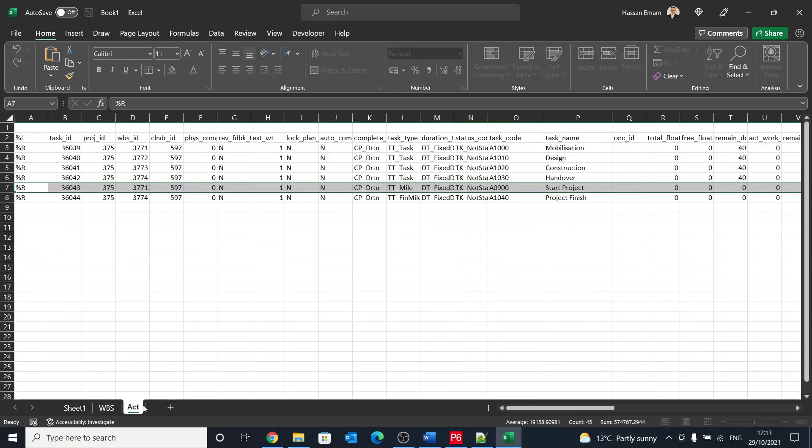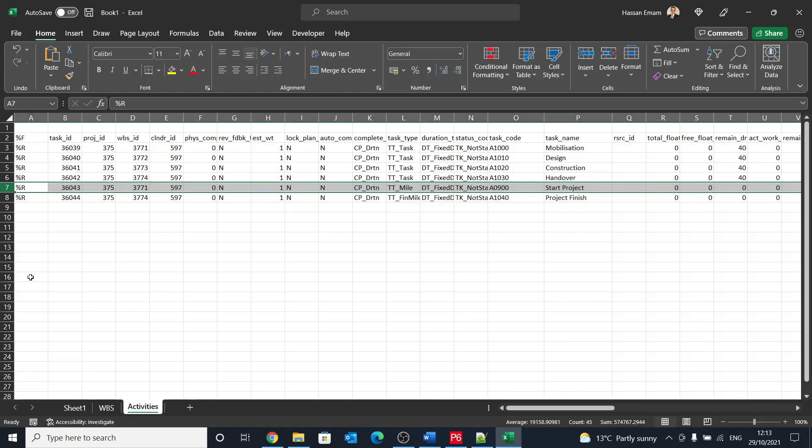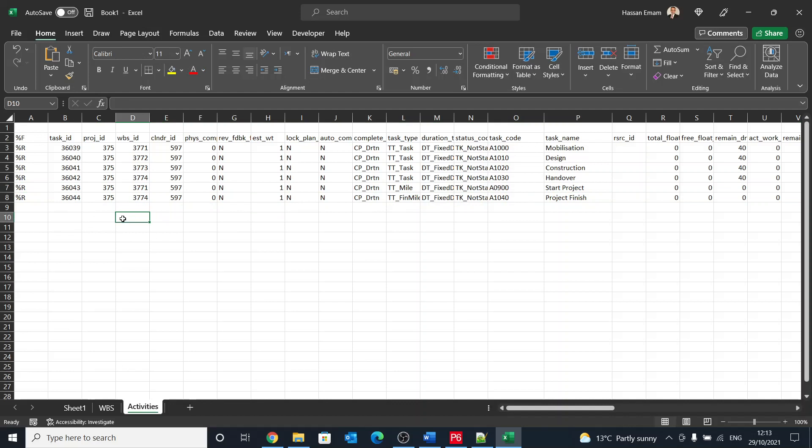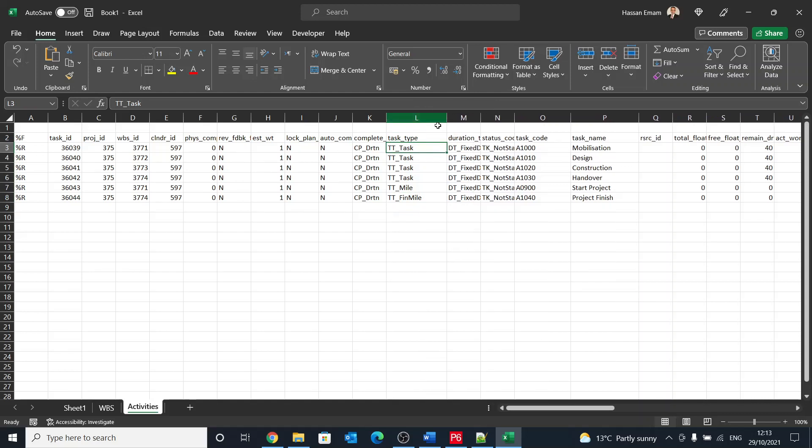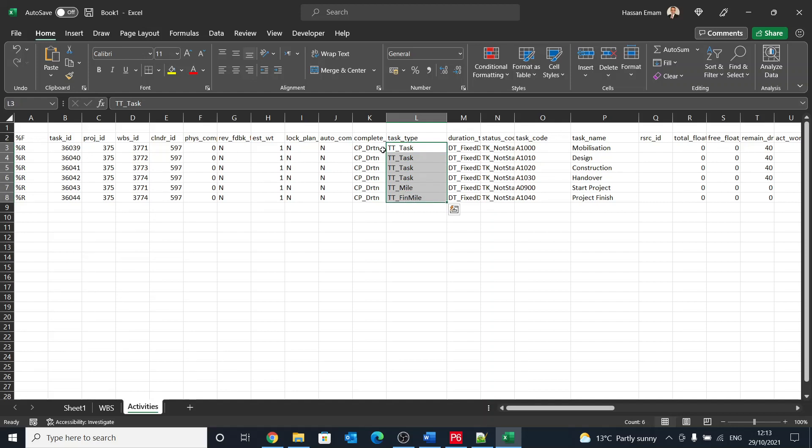Let's call this stuff activities so we don't get confused. In the activities here we have task type, and there are different types. So TT_TASK, which means like it's a dependent task, and then TT_MILE is a start milestone, TT_FIN_MILE is finish milestone. How do you understand this way or how do you map them out to what you understand in P6? Of course, you can also see here percent complete, DRTN which is duration.